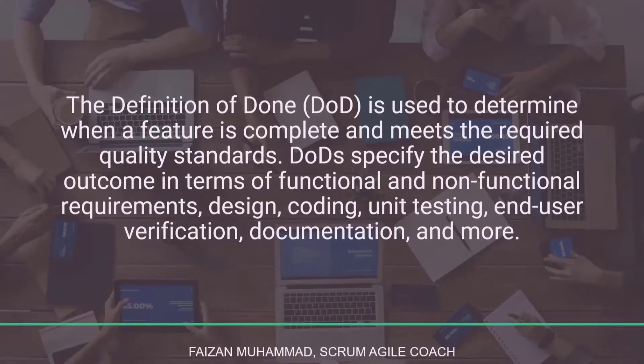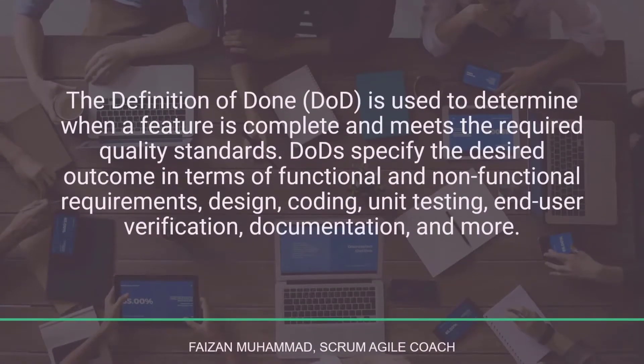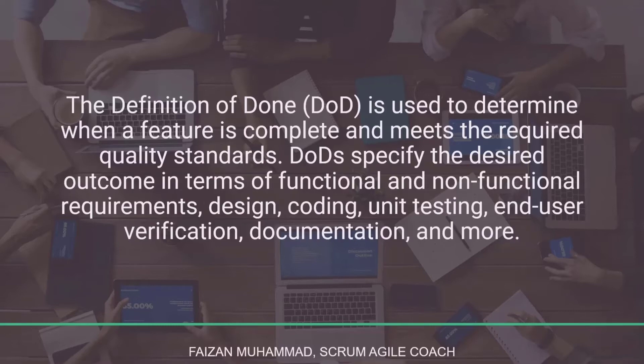The Definition of Done, or DoD, is used to determine when a feature is complete and meets the required quality standards. DoDs specify the desired outcome in terms of functional and non-functional requirements — the designing, coding, unit testing, user verification, documentation, and more. DoDs are defined at both levels of user stories and tasks. User story DoDs focus on functional and non-functional client requirements, while task DoDs focus on the desired working activities of the scrum team members.